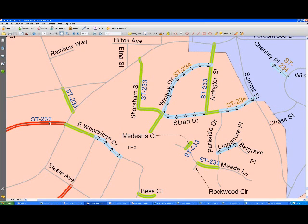So Water Management has, of the thousands of streets that we're resurfacing, in this picture most of them are green, but in reality and citywide most of them were either cyan or red, in that we couldn't go resurface them. So our resurfacing contractor said, well, we don't want to get started on this block and then have to pull back and come another time to do this block in the middle after Water Management finishes. So we needed a way to schedule Water Management's work at the same time we scheduled our own.